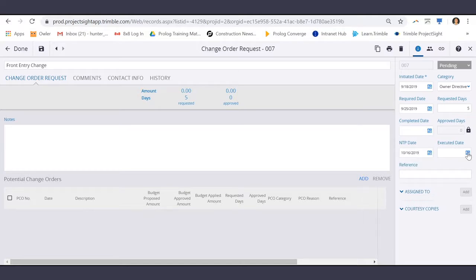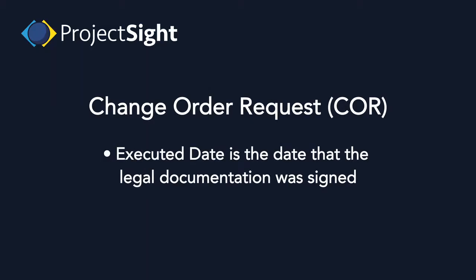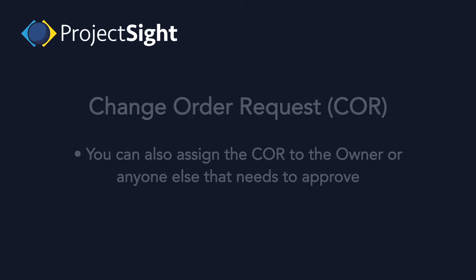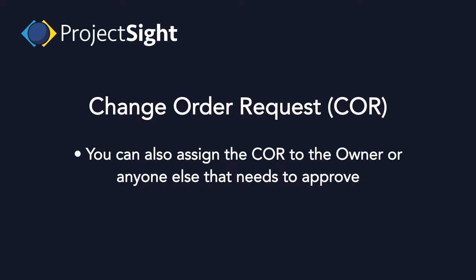and the executed date, which is the date that the legal documentation was signed. You can also assign the COR to the owner or anyone else that needs to approve.